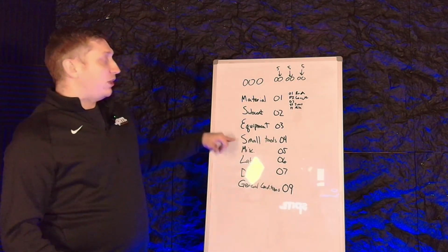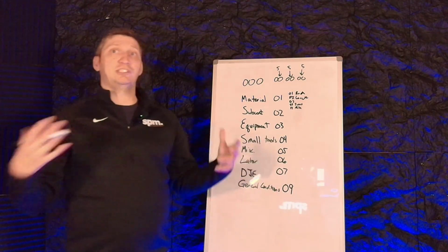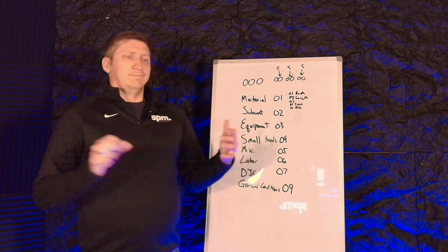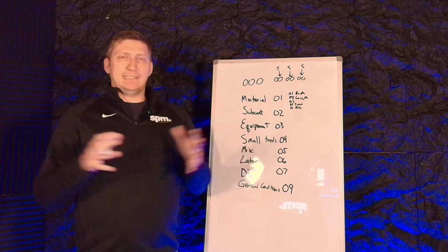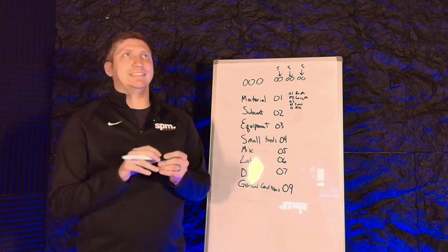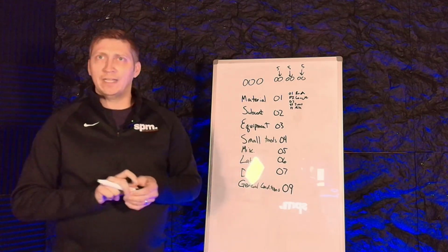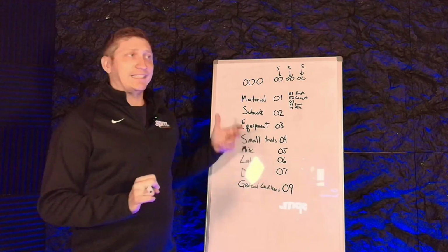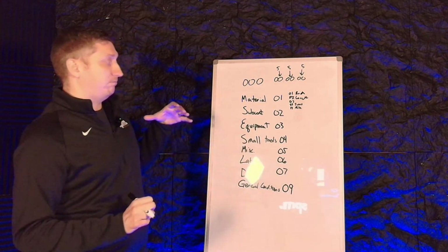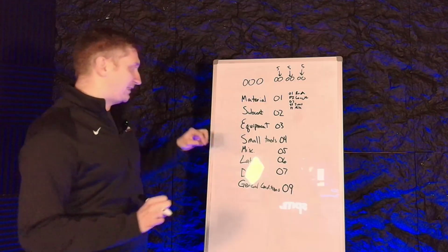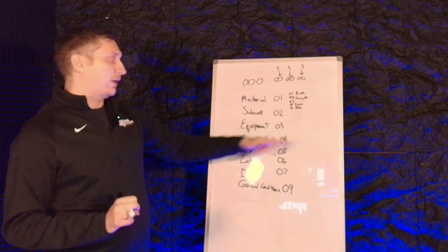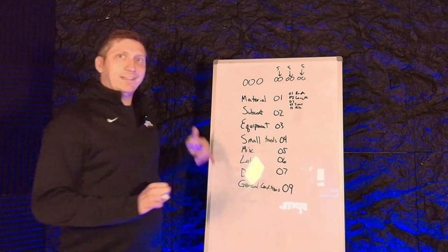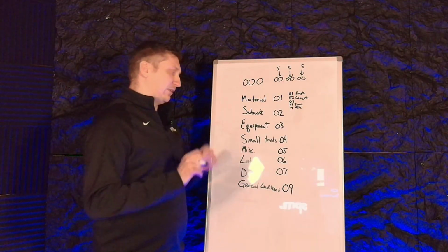At the same time, if you know that you're going to buy something on every job, I have a contractor that does a lot of ground stakes of some kind for survey. Not even survey. It's for erosion control. And they buy a staple gun every 3 projects, and they put it in there as that actual thing. And they spend hundreds of thousands of dollars on these things because they do so much of it. So we actually have a broken out section for staple gun in their budget, so we make sure we're tracking it right. And then miscellaneous small tools is its own thing.